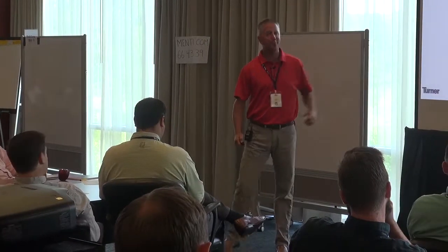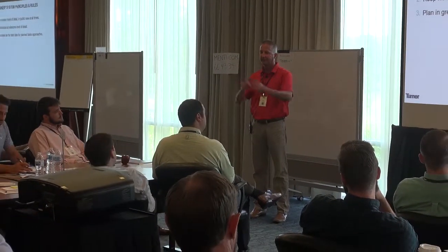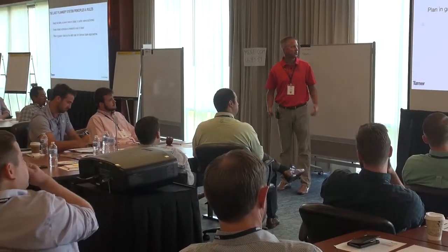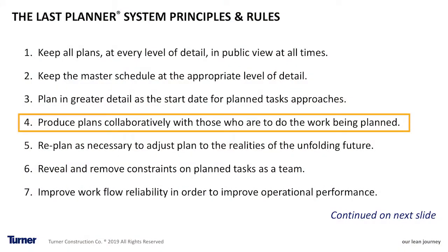And that's what we do with our pull planning and the components of Last Planner: planning that work in greater detail as the work is coming closer to you. Number four, produce plans collaboratively with those who are to do the work being planned.